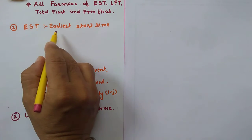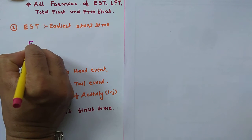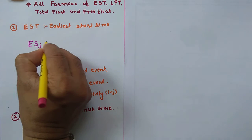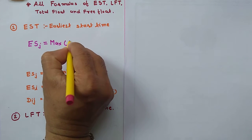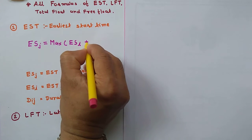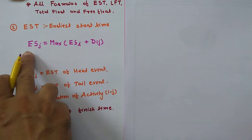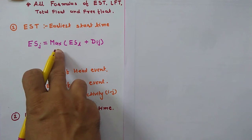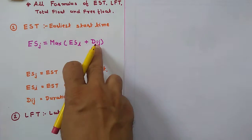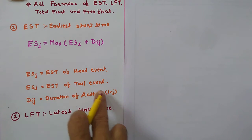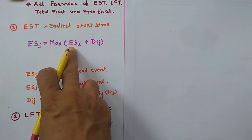First is EST — Earliest Start Time. The equation for EST is: ESJ is equal to the maximum of ESI plus DIJ. ESJ means the earliest start time of the head event, ESI means the earliest start time of the tail event, and DIJ means the duration of activity I-J.